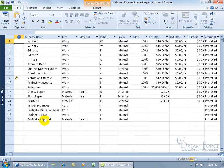Let's go ahead and first assign these budget resources. Just like we assigned all the other resources to a task, what task do I assign my budget resource to? It's going to be the project summary task, because that's what you're keeping track of — the budget for all the materials, all the work, all the costs within project. Our first step is going to the Gantt chart to assign our budget resources to the project summary task.